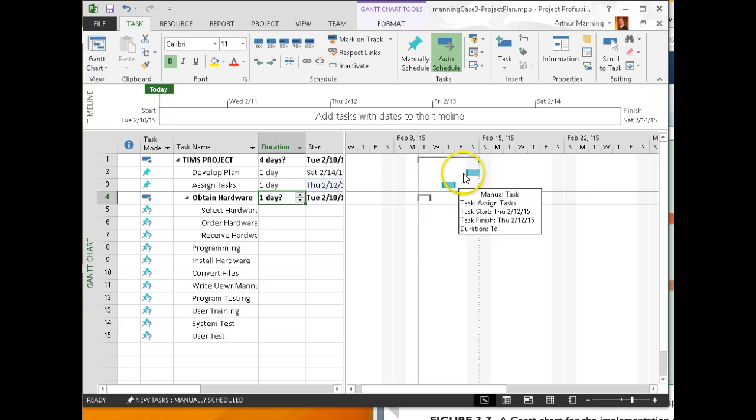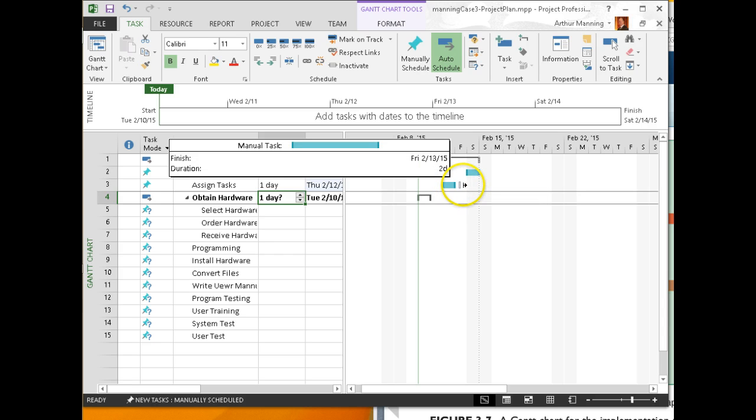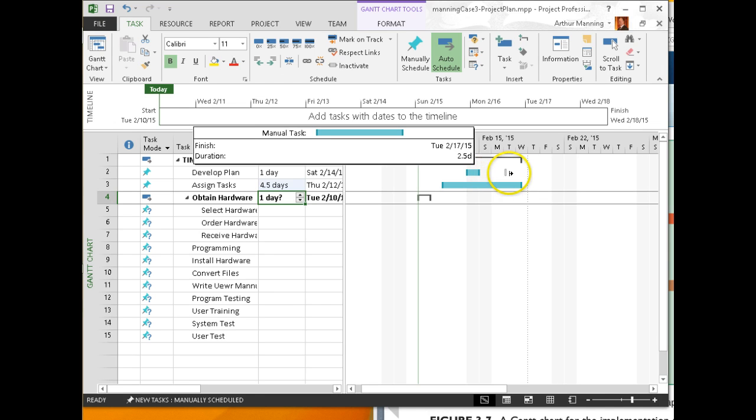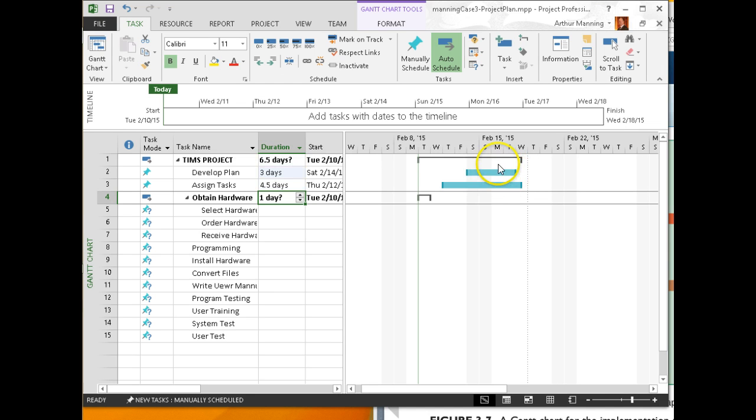Now, the Gantt project that's online, I could grab my little line over here and stretch it for duration. Yeah, that's stretching the duration. You just have to grab it in just the right place. Grab the little end arrow. Now see how duration is being stretched. So I can graphically adjust my duration or manually enter my duration here.